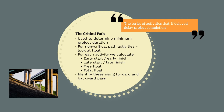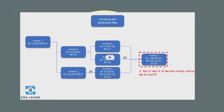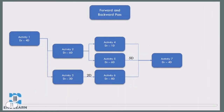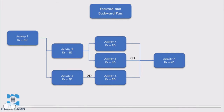Activities on the project critical path will have a total float of zero. Therefore, a delay to one of these activities delays the project completion. We can calculate float using a forward and backward pass of the network schedule. We'll go through first a forward pass to calculate the early start and early finish for each activity, and then a backward pass to calculate the late start and late finish. Float can then be calculated based on the difference between early start and late start. This will allow us to identify the project critical path. So let's look at a slightly more complicated network schedule with seven different activities.